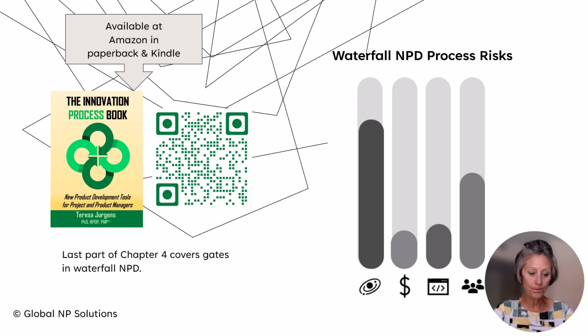No-go decision. A no-go decision means that the project will be halted, often referred to as a kill decision. There are many reasons to kill a project, such as the product failing to meet expected customer needs, realignment of the corporate strategy, or unfavorable financial outlooks.